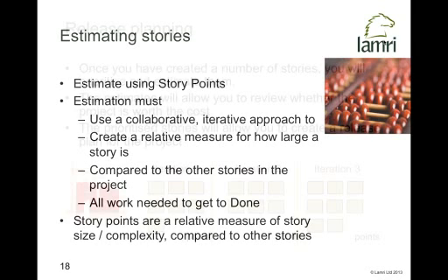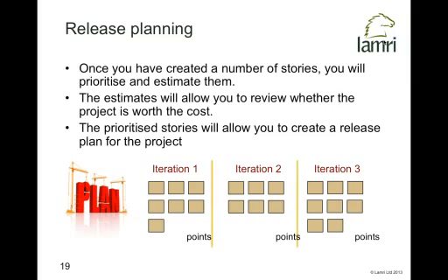Once we've estimated our stories, we can lay them out over a number of iterations. That allows us to start saying we're delivering these features at these particular points in time, and also to effectively work out how much it's going to cost to do the project. So it's a high-level plan.